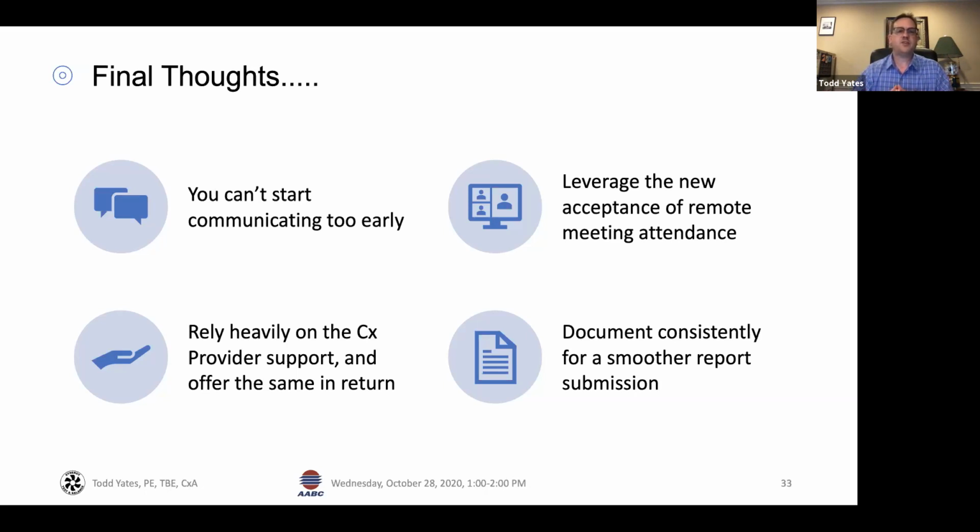We can get so much by working with the commissioning provider on a project, to schedule and sequence, to ask them, okay, when you're doing your site observations with this type of system, I often see this mistake. And can you keep an eye out for that? They will happily do it. If you are pointing out something that they can catch early, that's a benefit to them, a benefit to the project, it's in their best interest. That's what they're for. They're there as the owner's advocate, and they want to make those things happen.